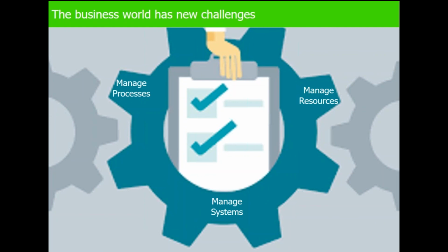We already discussed the waterfall challenges and some of the benefits. The challenges are easy. Change is expensive. Sometimes quality suffers because we might run out of budget during the testing phase, and therefore we can't provide an accurate QA process. But the benefits are very clear for the business. First is planning. Planning for waterfall projects is very clear and concise. Requirements are usually hashed out and understood very clearly prior to development, and the phases can be measured in elements of time or money.